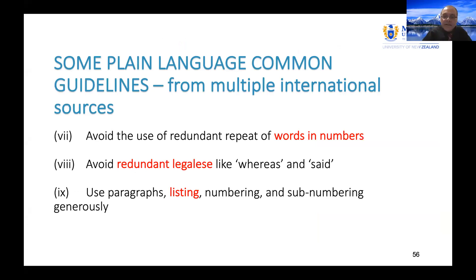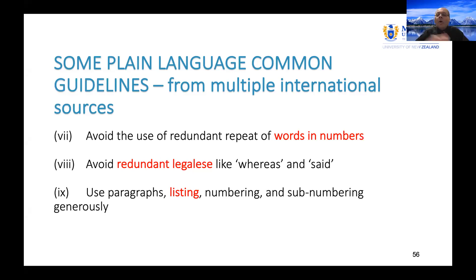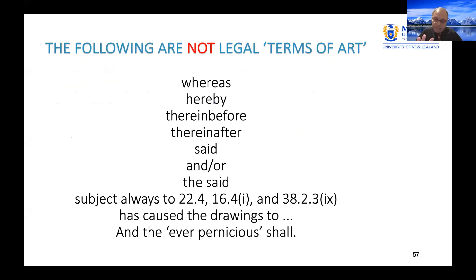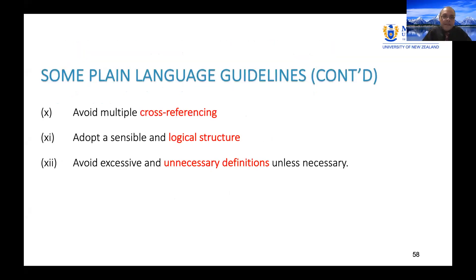Use paragraphs and listing, which is good practice. These archaic words — 'whereas,' 'hereinbefore,' 'thereinbefore,' 'thereinafter,' 'said,' 'and/or,' 'subject always' — are not legal terms of art. Multiple cross-referencing, 'subject always to this, that, and the other,' is dead drafting. A sensible logical structure in a construction contract means collecting all time clauses together — commencement, progress, programme, extension of time, completion, non-completion — then all money clauses — bonds, insurance, payment, retention, final accounts — then all quality clauses. Why can't all construction contracts be rearranged into a logical structure?